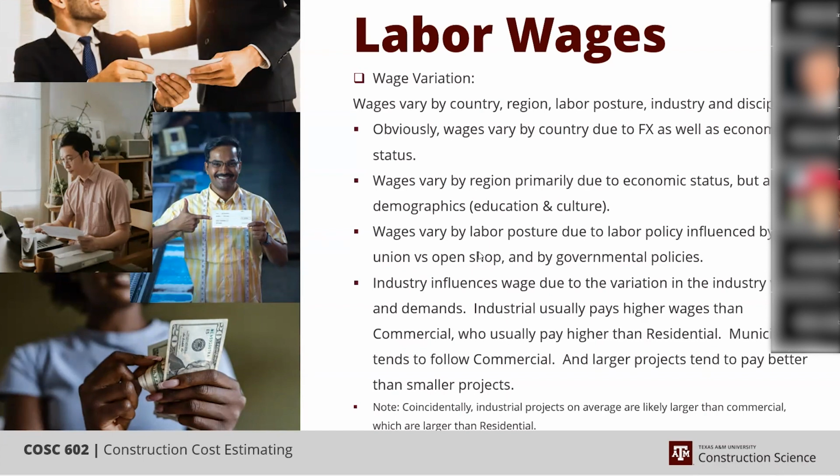So the wages tend to follow that scenario, but not always true, because you have exceptions. If you have a commercial building construction job that's $1.5 billion, the pay on that job I think is going to be closer to what you normally will see in an industrial project, and some of these industrial jobs that are really small will decline a little bit.